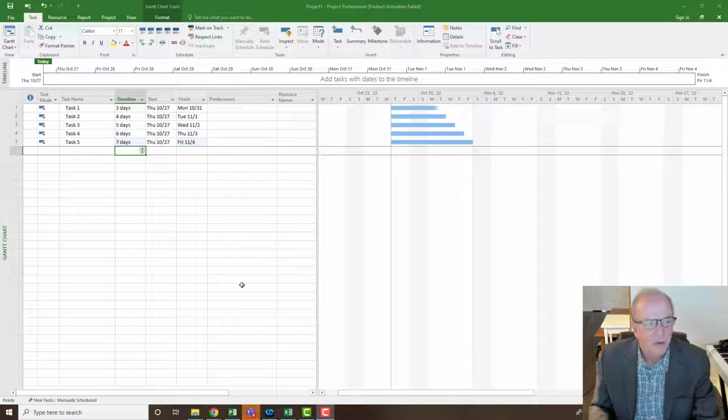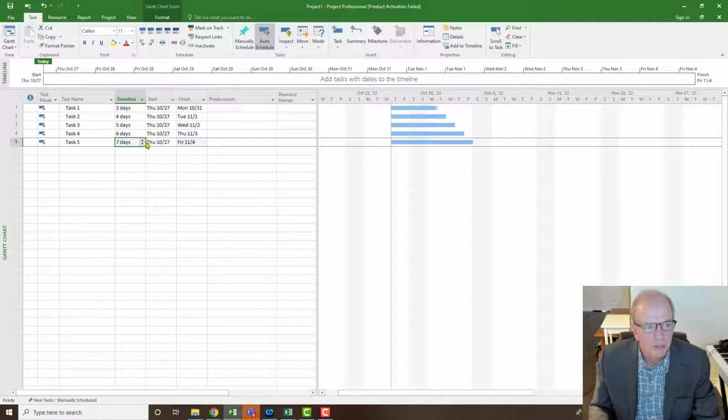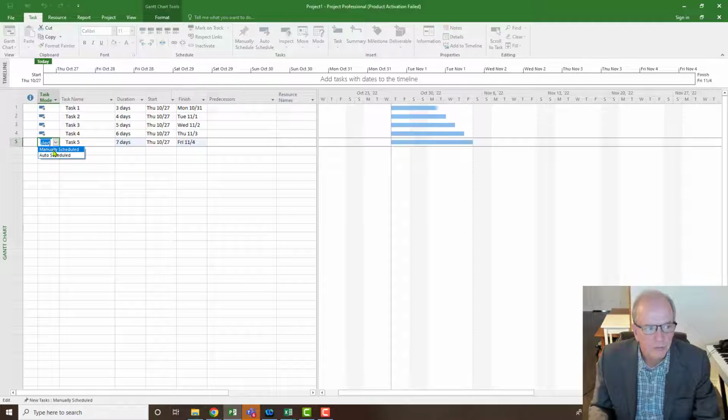All right, so I would suggest you type in maybe 5 activities and put in durations similar to this. Don't worry about your dates, they're going to be different than mine. And make sure that things are in auto schedule. So if you're seeing something like a thumbtack, make sure that you've changed that to auto schedule.